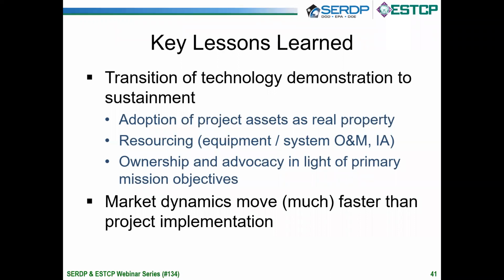Another key issue on this project was transition from demonstration to sustainment. Ultimately, Raytheon can't own this equipment forever. So we need to be able to transition it to the Air Guard and the Air Force. And the way the military operates, the processes to resource such things have to start significantly earlier than these demonstration projects would desire them to. So getting a budget line item into the plan for the installation that's going to take ownership of the property is kind of a big deal, and it's still something that we're working with the Air Guard on this project.